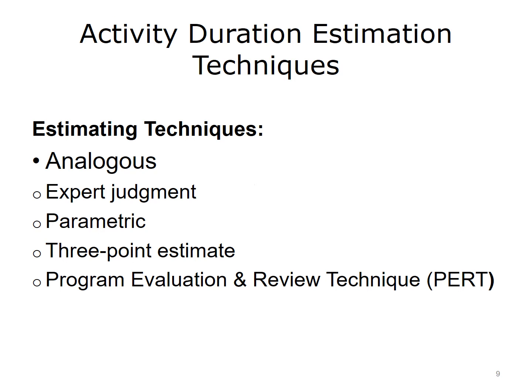A project manager may use such expert judgment techniques as acquiring estimate information from individuals with historic information or experience related to similar prior projects. It is not uncommon to bring in someone with expert judgment to help perform project estimation. A parametric technique is a statistical approach to develop estimates based on historical data and other variables, such as square footage or labor hours per unit of work.